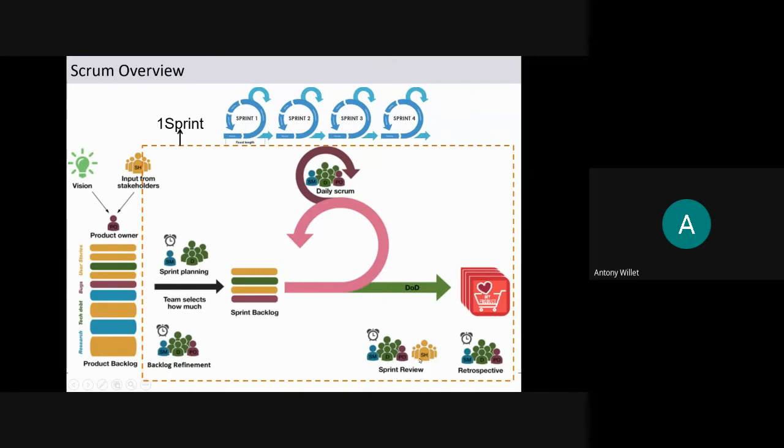This is where the customer or anybody, internal customer or external customer, other stakeholders, will give feedback about the increment to the development team or to the product owner. This will be taken and created as new user stories or new issues, and they'll be added to the product backlog. And then the team meets to check how the sprint was executed, what went well, what did not go so well, and what the improvement points are. Okay.